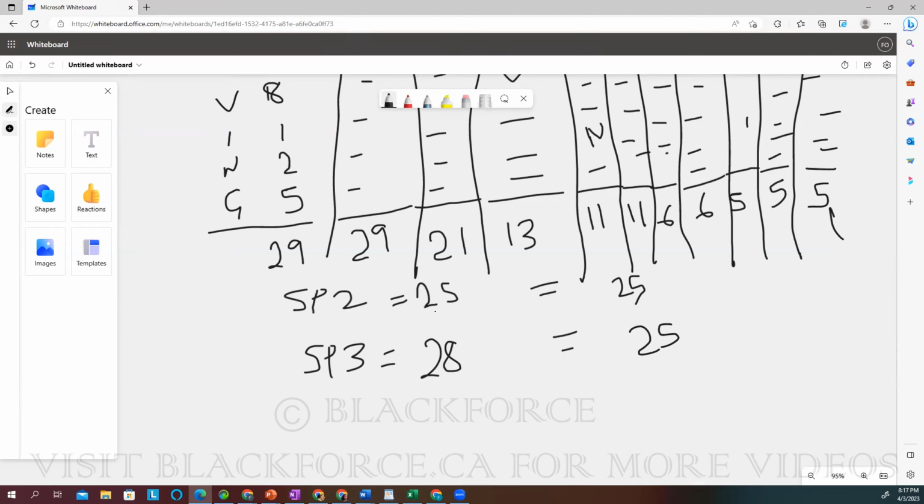So they took in 25 and they actually finished that 25. So they will say, oh, sprint 2, we finished 25. Maybe we had a bit more capacity. Maybe we can do more, right? They decided that in sprint 3, they should take in 28, right? But they still finished 25. So what the team will now do is what we call the average velocity. They want to find their rhythm. They want to find out what their average velocity is, what their capacity is, what they can actually finish in a sprint.